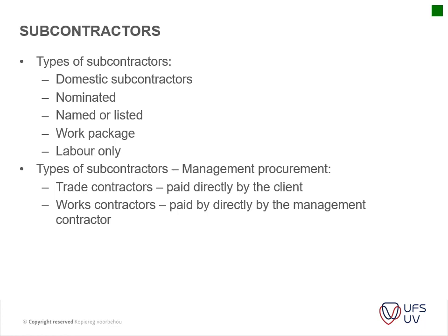Then you've got your different subcontractors, and I'm not going to go into this in too much detail, although you should go into this in detail. There are, for instance, your domestic subcontractors, the ones that you appoint, for instance your electrical contractor, your plumbing contractor, etc. The ones that form part of your company, whose health and safety file falls underneath your health and safety file, that type of thing.